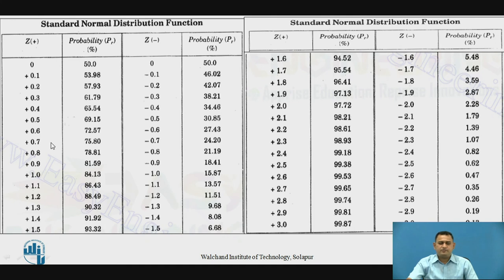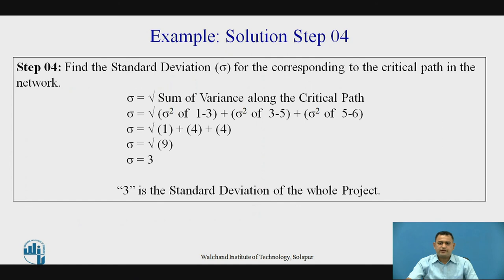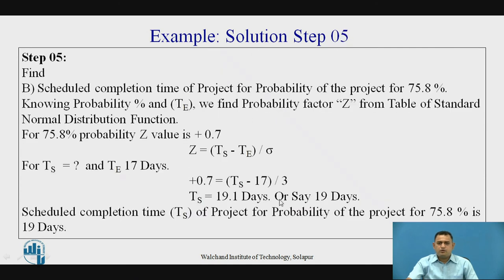Previously we found probability from the Z value; here we find Z from the percentage. With Z = 0.7, we place the values of Z, Te, and the standard deviation into the formula to get the scheduled completion time Ts. By substituting all values, Ts = 19.1 days, or approximately 19 days. So the scheduled completion time for a probability of 75.8 percent is 19 days.